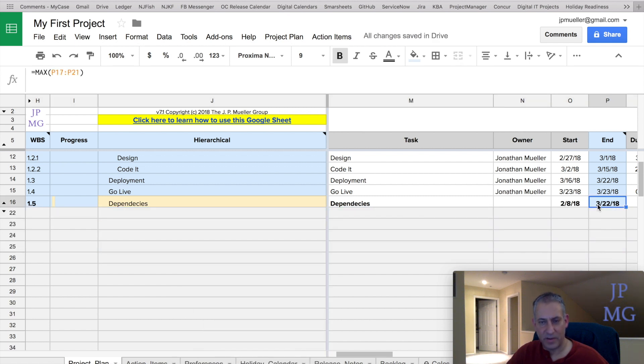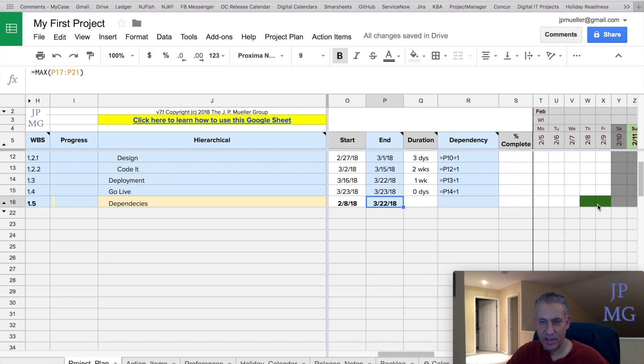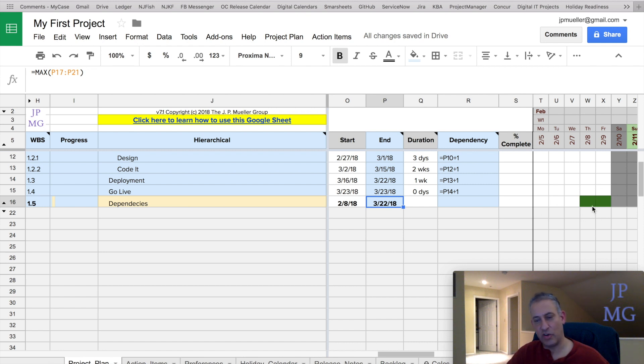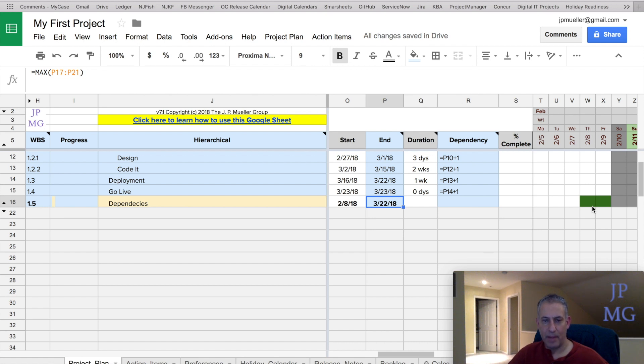But it does it automatically for you. The other thing it does is makes a Gantt bar representative for this line, which is all the subtasks, and has it in that dark green. So visually, you have a clue that it's a parent task of rolled-up tasks or hidden tasks, if you will.